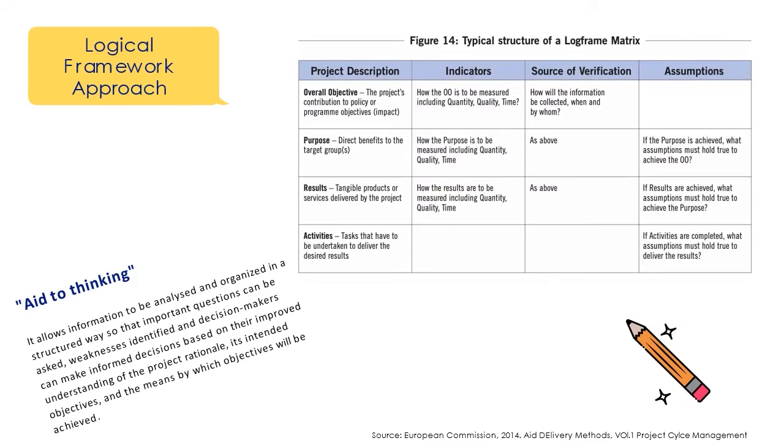Now it is important that we focus on the definition of the logical framework approach, LFA. The LFA is an analytical process and set of tools used to support project planning and management. It is used, in one form or another, by most multilateral and bilateral aid agencies, international NGOs and by many partner governments. The LFA should be thought of as an aid to thinking. It allows information to be analyzed and organized in a structured way, so that important questions can be asked, weaknesses identified and decision-makers can make informed decisions based on their improved understanding of the project rationale, its intended objectives and the means by which objectives will be achieved.